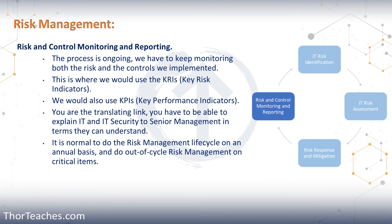In most places I have worked, we would do an annual risk assessment for everything. But when we introduce new environments — new servers or new processes — we would do the risk assessment right then, and include it in the annual one the following year. With very critical systems, maybe this cycle is not one year; it could be every three months. For the exam, that level of granularity isn't needed, but you need to understand it is an iterative process. We are never done, and with so many different types of risks, we will be in different phases for different risks at the same time.